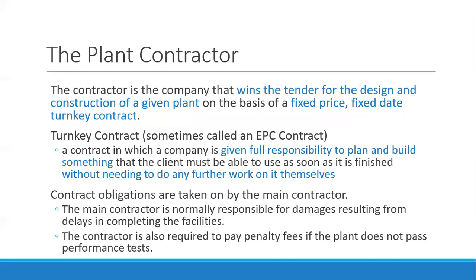A plant contractor is the company that wins the tender for the design and construction of a given plant — the technical person who builds the plant based on required specifications. Usually it's on a fixed price, fixed date basis, or a fixed price, fixed date, turnkey contract. For fixed price, the contractor must quote a fixed price — not a cost-plus price.